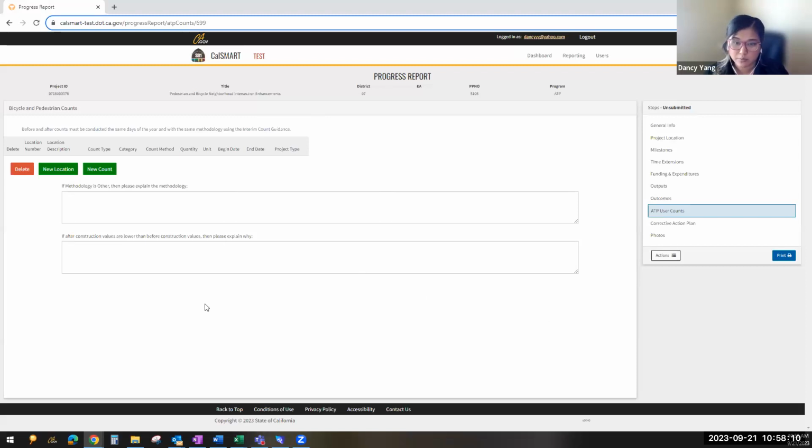So it's very, very important that you keep those in mind so that when you do your after counts in your final delivery report, they are done during the same time. If you miss that time period, we're going to have to start flagging you and seeing why you didn't provide your after counts. So again, your before counts are required in the progress reports, and the after counts are required in the final delivery report, not the completion report.